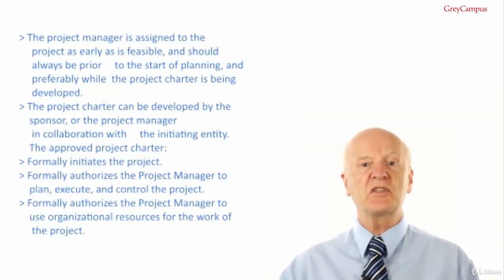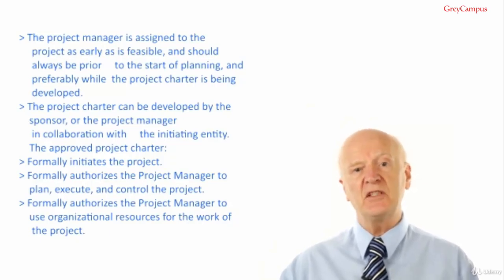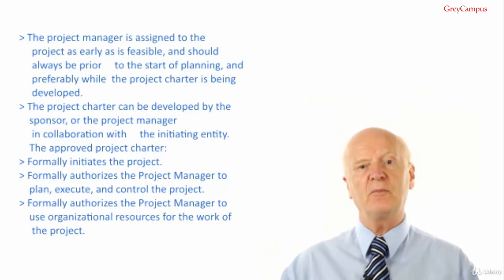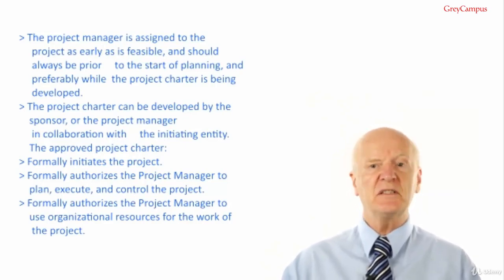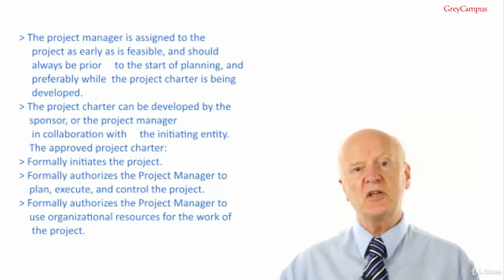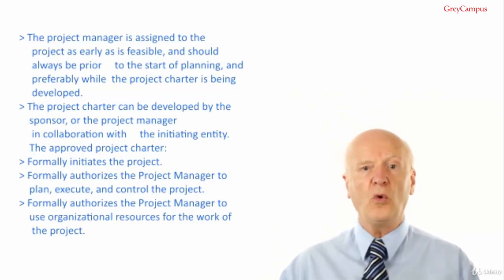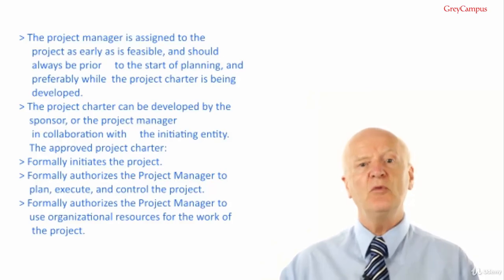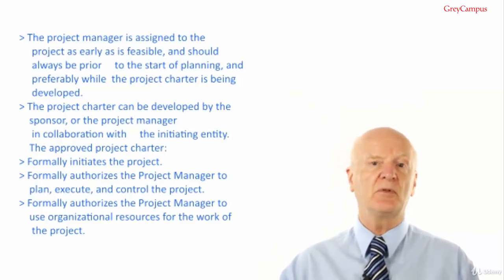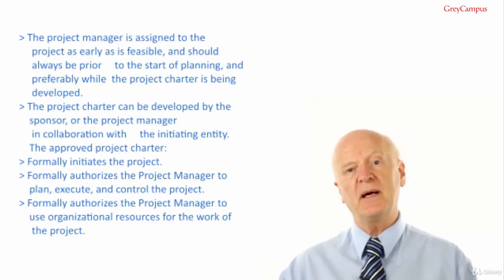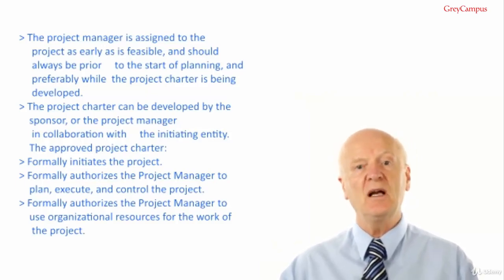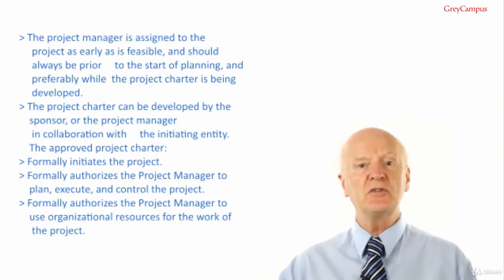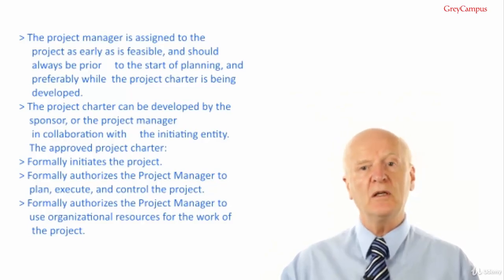Please note the following for the exam. Often these appear in questions. The project manager is assigned to the project as early as is feasible and should always be prior to the start of planning and preferably while the project charter is still being developed. The project charter can be developed by the sponsor or the project manager in collaboration with the initiating entity. The approved project charter formally initiates the project, formally authorises the project manager to plan, execute and control the project, and formally authorises the project manager to use organisational resources for the work of the project.